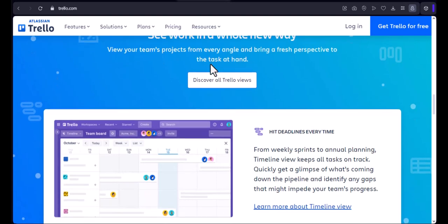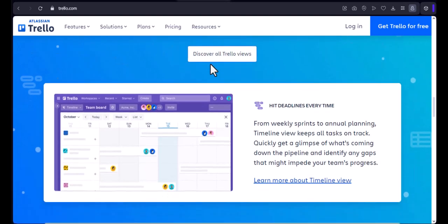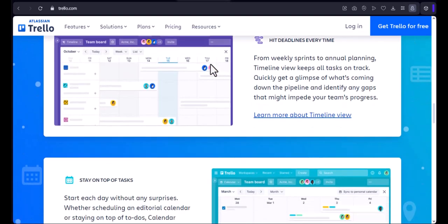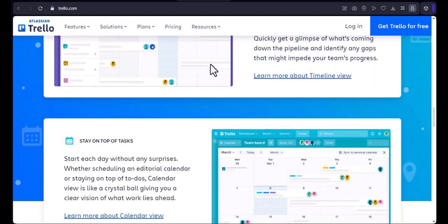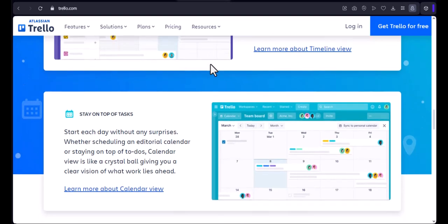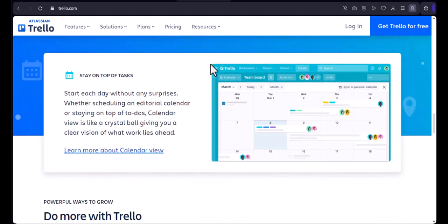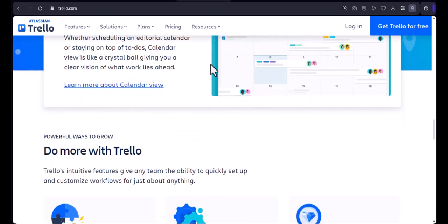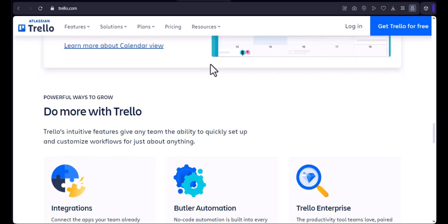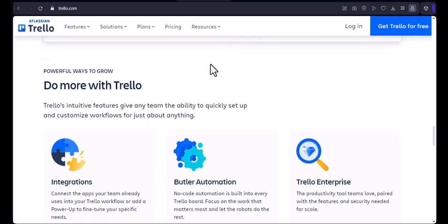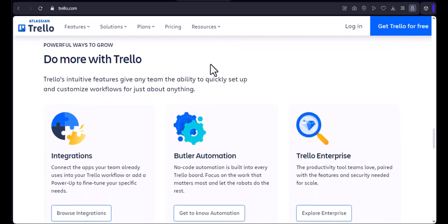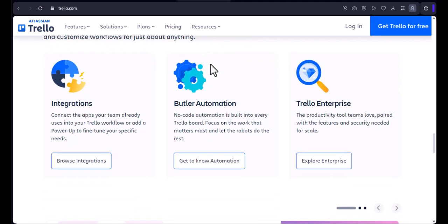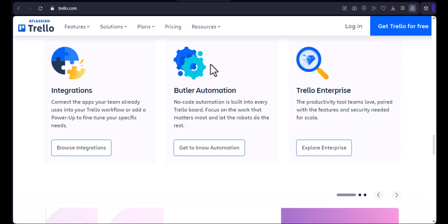Working with Trello in an agile way. Now that your board is set up, here's how to use it in practice. For a Scrum team, at the start of a sprint, your team moves cards from the backlog to the to-do list. During your daily stand-ups, everyone can quickly see the board and give updates. As a team member begins working on a task, they move the card to in progress. When it's finished, it goes to review and finally to done. This simple act of moving cards provides a powerful visual of your sprint progress.